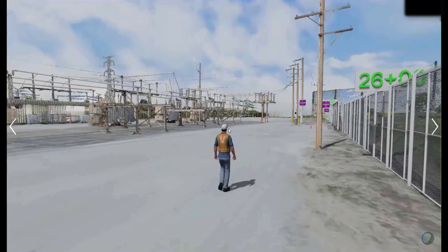Now, I don't know if any of you have a construction background, but we use what's traditionally called BIM, Building Information Modeling. All of these virtually constructed elements have metadata attached to them. So for every 8-foot section of fence, we can embed any kind of data we want into it, any kind of specs, but most importantly, all of the cost data: the installation costs, the material costs, the maintenance costs, especially when we're talking about some of the technology components. All of that data gets embedded into these virtually constructed elements.